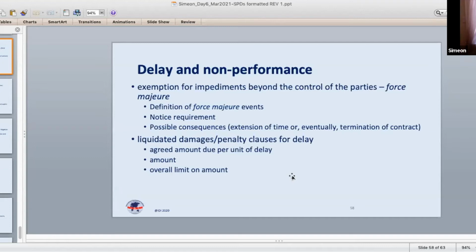If there is to be a claim for a force majeure basis for excusing delay, that has to be notified essentially promptly to the procuring entity. Otherwise, the supplier or contractor may actually be barred from asserting such a justification or an excuse for delay if there hasn't been proper notice of that situation given to the procuring entity or to the employer.